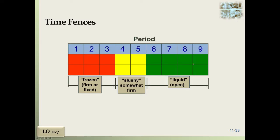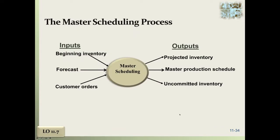These are the different periods that you've been looking at. They're trying to lock up the first three periods, and then the middle two periods are going to be a little squishy and still be adjusted. Then this is really open, and you don't really have a lot there yet. Where the aggregate plan had a little bit more definition, when you disaggregate and put it into the master schedule, it's just a little bit squishier on the end time caps.